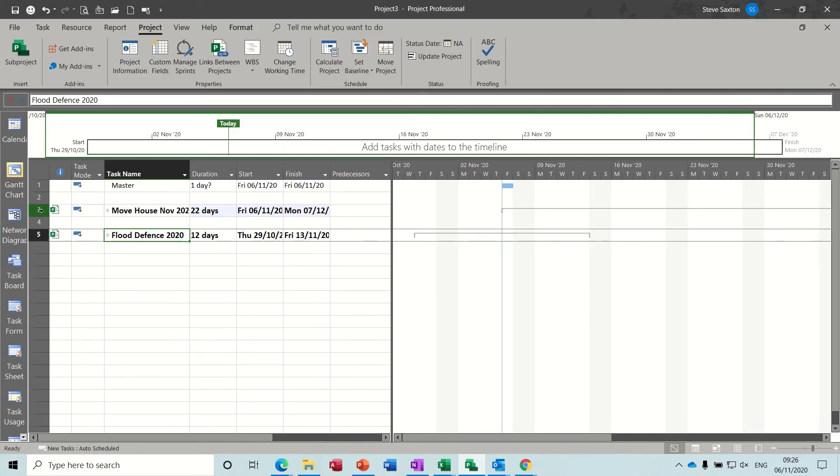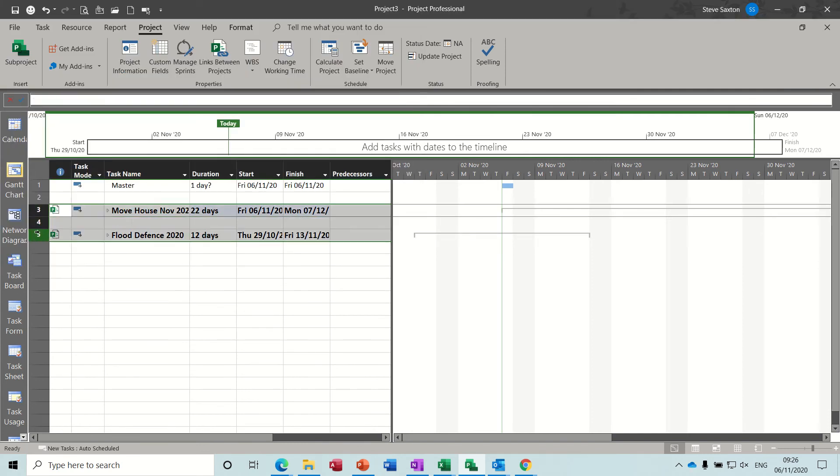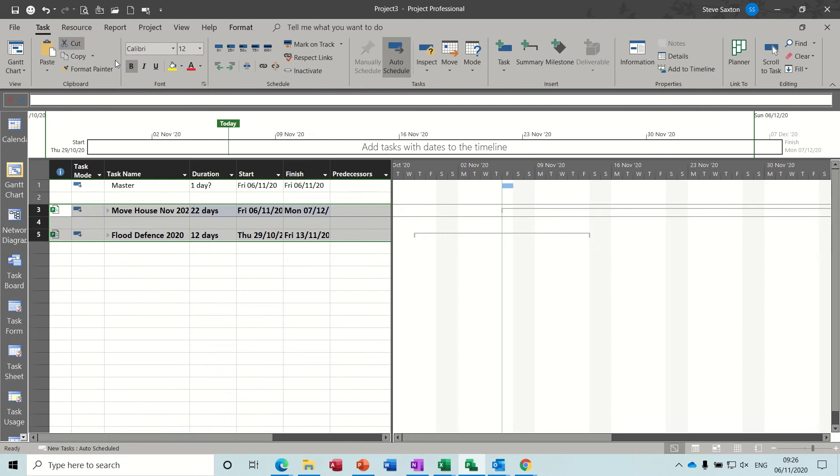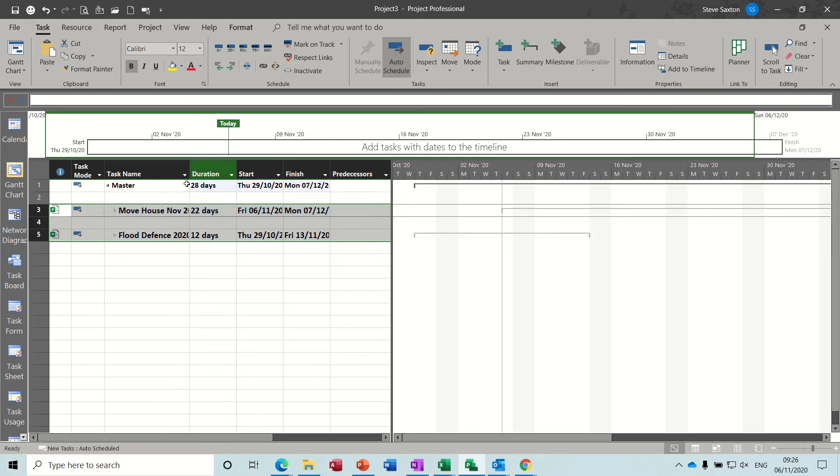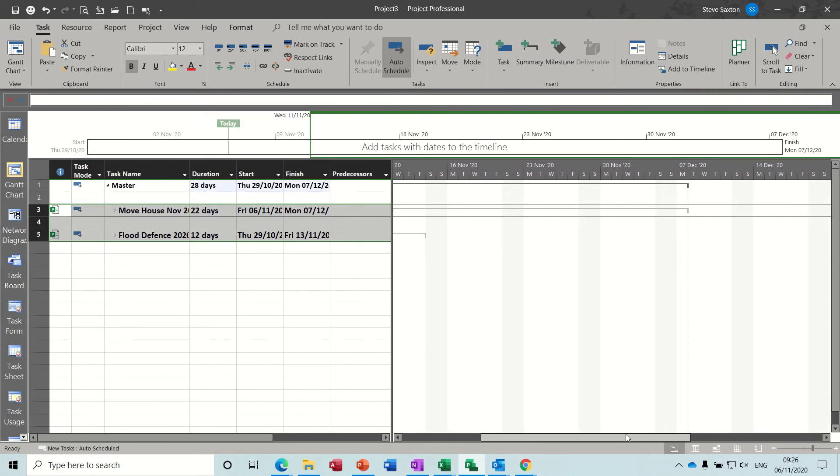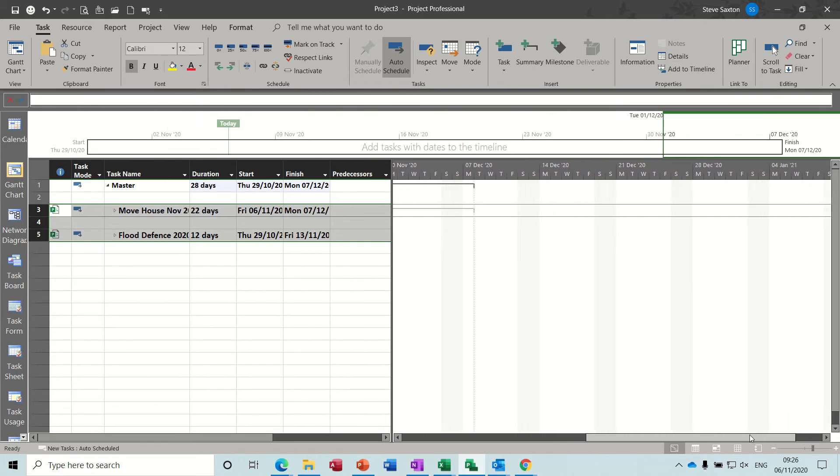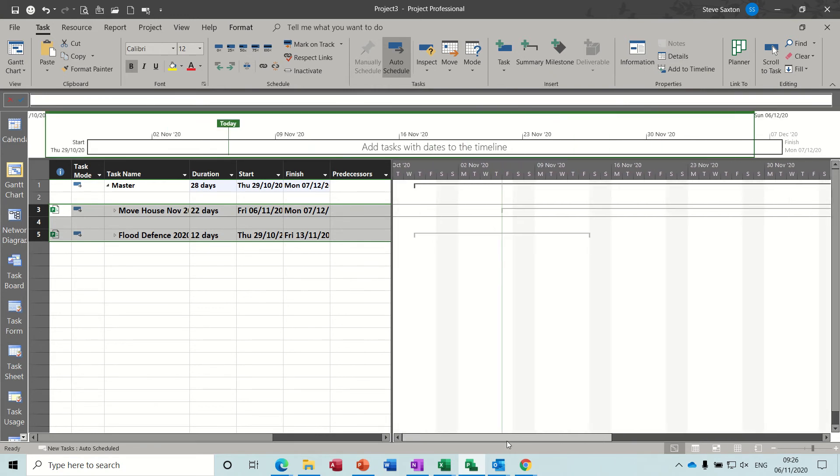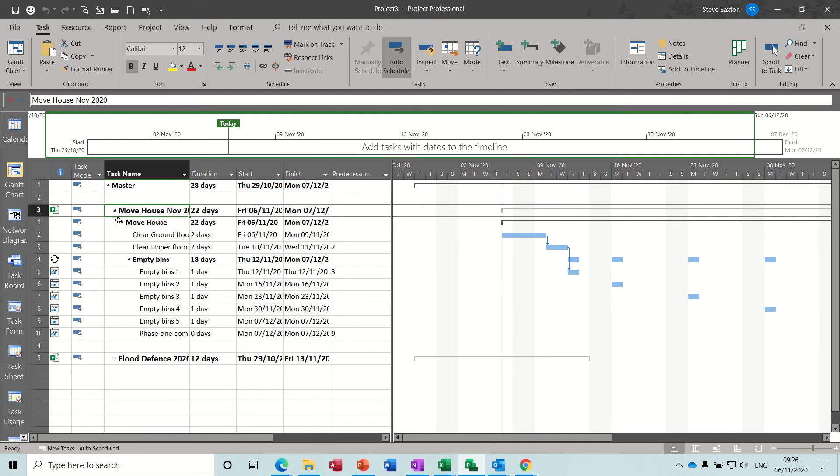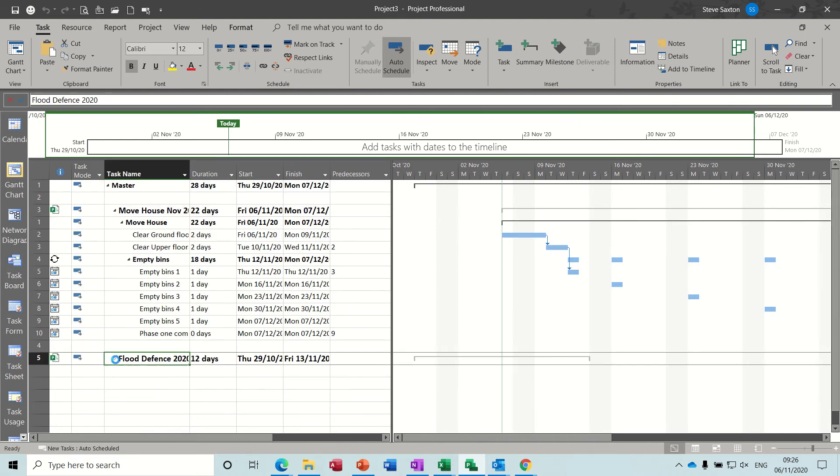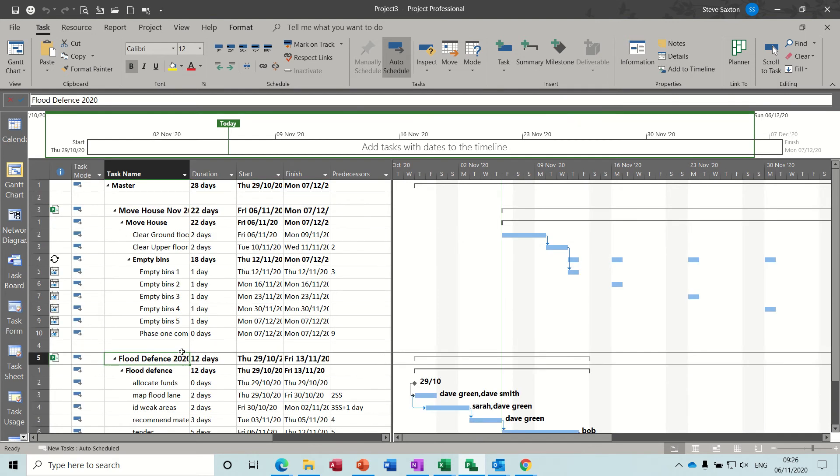Now if I indent these two, the duration will be picked up at the top, 28 days total duration on these two projects and you get the timeline on the right there on your Gantt chart for these two projects. Now if I click on these little arrows that will expand each of these projects and you can see the detail on each of these projects.